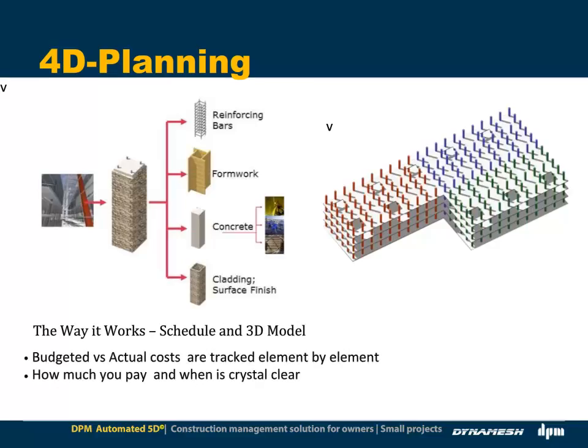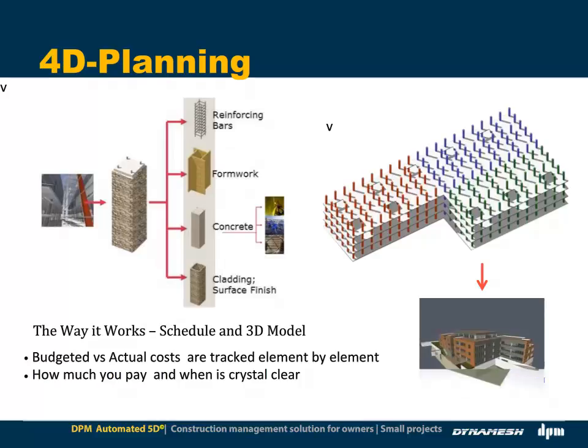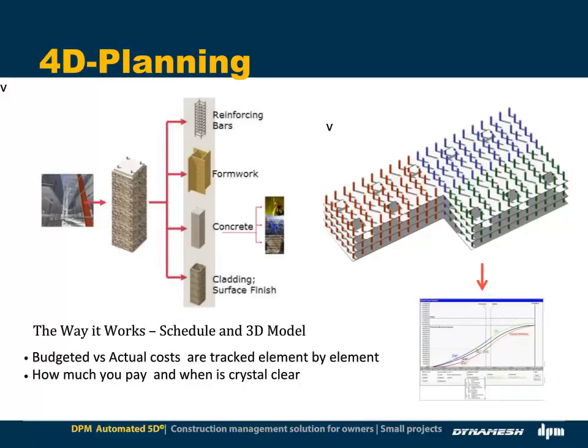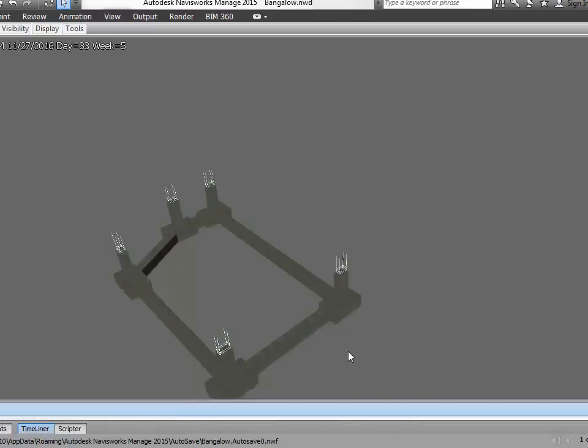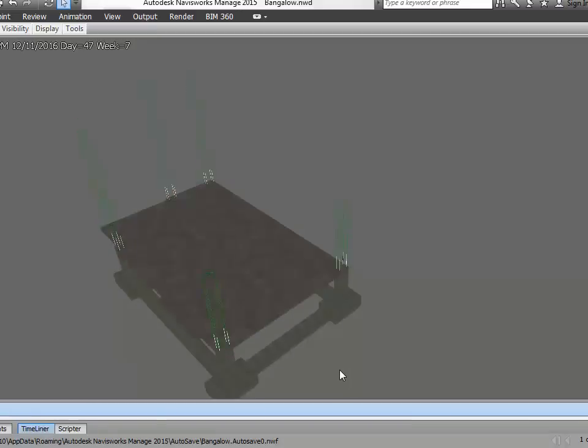After optimizing quantities and costs, 4D planning is directly linked to BIM design so that all the elements of the construction can be accounted for, and an error-free planning becomes the norm. Cash flows are automatically generated here also, and each construction element can be assigned its relevant subcontractor with its contract costs and time limits. Small projects are rather more costly than bigger ones due to their lack of an economy of scale. That is why full coordination and synchronization is important to control cost.